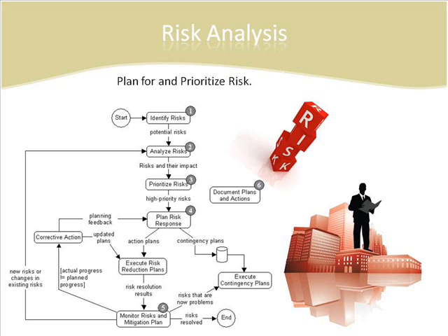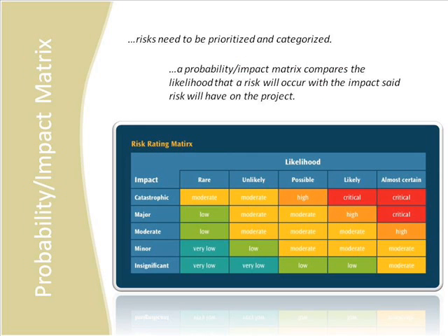As a responsible manager, it will be your job to be aware of your project's risks and to assess and prioritize these risks. The risk impact probability chart is based on the principle that a risk has 2 primary dimensions, probability and impact. Probability is the likelihood of a risk event to occur. The probability can range anywhere from just over 0% to just below 100%. Impact is the effect the risk will have. Risks can be both negative and positive.